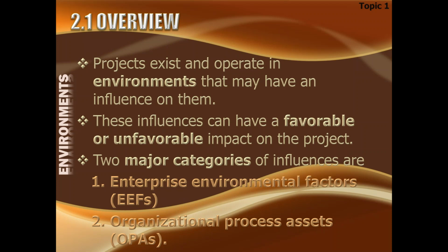Like you see, severe weather is impacting your project, so that is a factor. Government regulation is impacting your project, that is a factor. The customer wants something, so it is impacting. Market conditions, or maybe the dollar value has gone up, and things like that. All of these things are, in one way or the other, impacting your project internally or externally. So these are the enterprise environmental factors. We will talk about what the internal and external factors are, but generally speaking, these are factors, not documents.